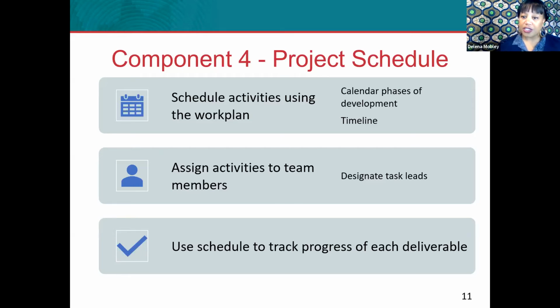I advise project managers not to set reminders on the actual day that things are due, that deliverables are due, or meetings need to happen. I would say schedule them a day before or maybe 2 days before, just in case things aren't progressing as you expected them to.